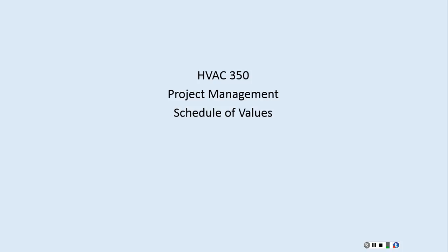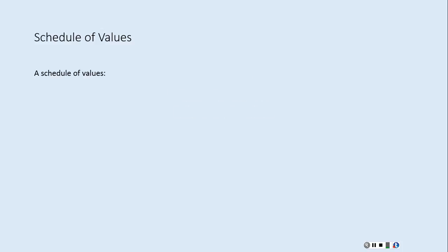What this schedule of values does is it breaks the entire project down by individual categories so that the superintendent, general contractor, or construction manager on the project can validate that we have a certain amount of work done that we say we have done, to protect the owner's interests so they don't overpay for items that aren't completed on a project. A lot of words just said there, but it's really a straightforward document.